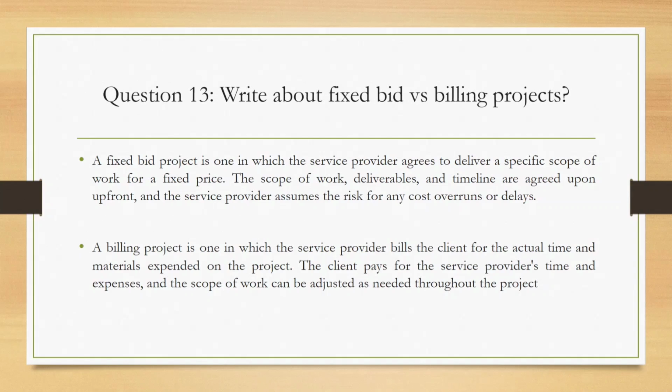Whereas coming to the billing project, the time and the budget are not fixed, and the budget will be released accordingly, based on whatever resources he uses. Resources means human resources. Like we are the BAs, right? So you people are BAs. Now think that I am a client. So I will be paying you according to the time which you have worked for me.